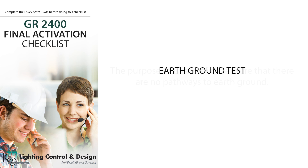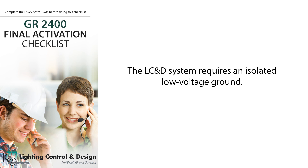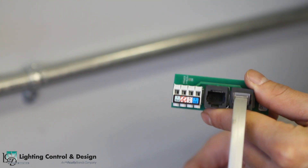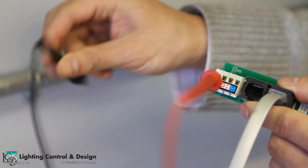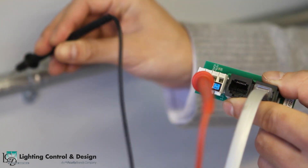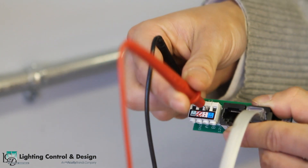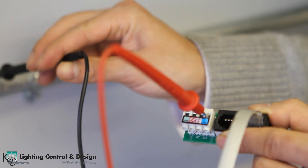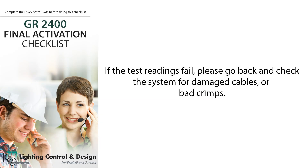The third test will be the earth ground test. The purpose of this test is to ensure that there are no pathways to earth ground. The LCND system requires an isolated low voltage ground. We can use the back plate on any panel, or any metal conduit that is grounded for this test. Measure resistance across the ground terminal to earth ground, from the A terminal to earth ground, from the B terminal to earth ground, and from the plus 12 terminal to earth ground. We should be expecting a reading of infinite or open on all of them. If the test readings fail, please go back and check the system for damaged cables or bad crimps.